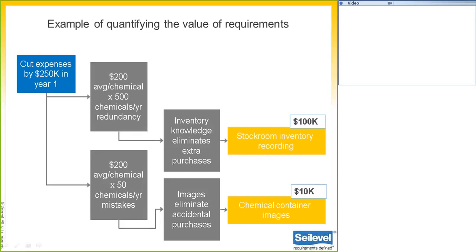And again, we're looking at order of magnitude here. We're not looking at a $100,000 feature versus a $101,000 feature. It's much more difficult to make decisions at that level. But if you can get to an order of magnitude, that at least helps you figure out where the highest value features are. And this is important because it's really easy when your project's moving along to arbitrarily add features that seem small, in other words, small for developers to implement. But in aggregate, the small features add up fast.